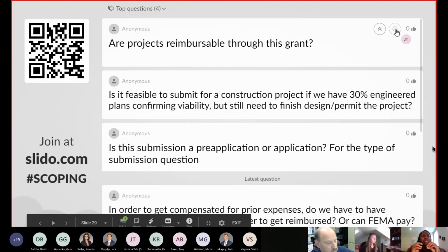If it is a pre-award cost, so again, a cost that's been incurred from you developing the project, then that could be included as a pre-award cost, and it is only reimbursed if the project is awarded. As far as how the funding flows, MEMA's policy is we do not advance funds. So if you are awarded a project, you will complete said task, pay it, submit the required documentation back to us, and you will be reimbursed for that.